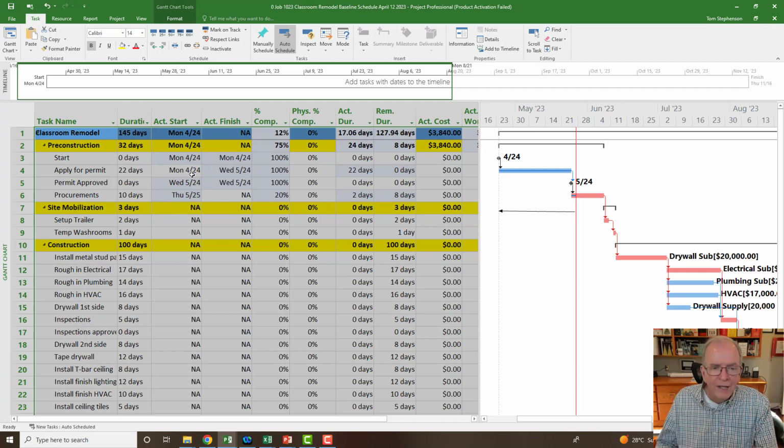I just moved the one where I wanted it, and then I just clicked the mark on track for the rest. Because you put a status date and you selected everything, it will only update what's to the left of the status date. It won't update anything to the right. So you're good as long as you put in that status date. That's why it's good to do that.